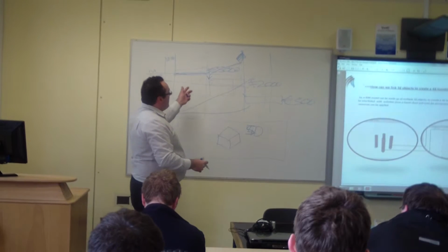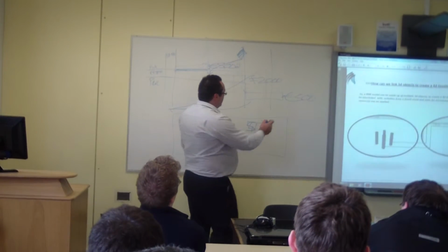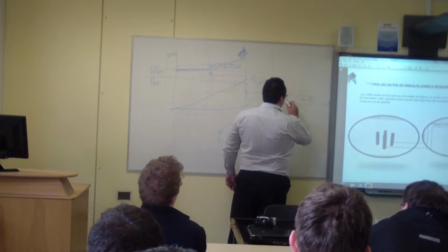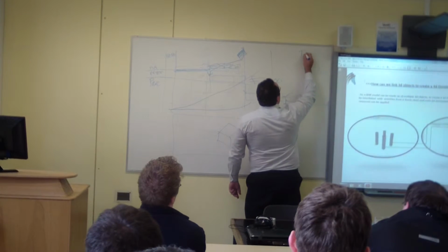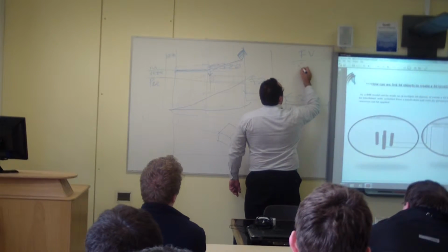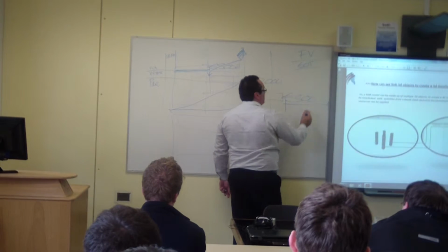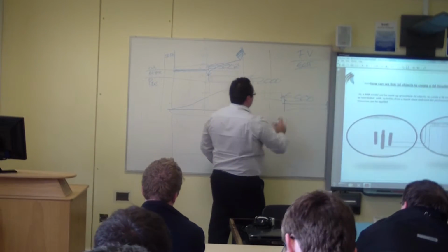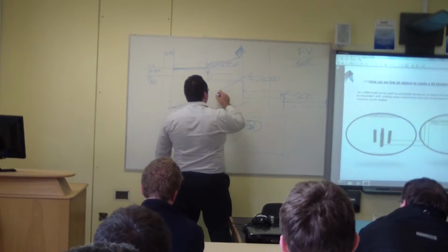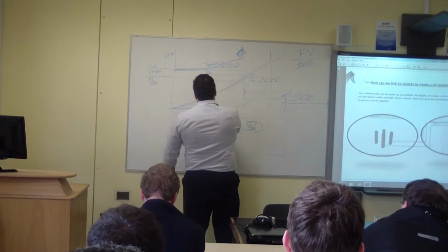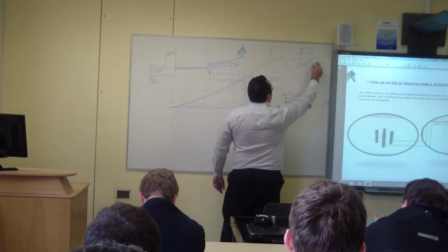What Microsoft Project will do is this will jump out by 1 week. It's called a finish variance. We'll call it an extension of time. It'll push it out by 1 week. What happens there is your cash flow, which was planned that way, is now doing that.